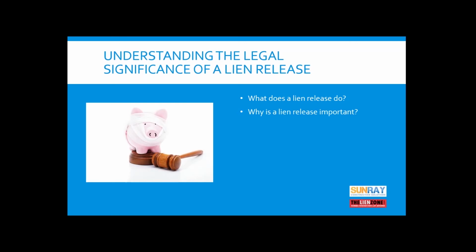When we deal with legal cases after the fact, when a dispute happens, one of the first things we do is look at the releases. And the reason is because when we can line up the releases, we can extinguish certain claims through the date of those releases. So it's important that you understand what the release is doing when you're exchanging it for payment, because you don't want to give up more rights than you are expecting for the check that you're receiving.